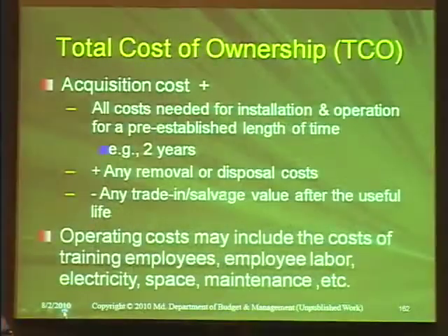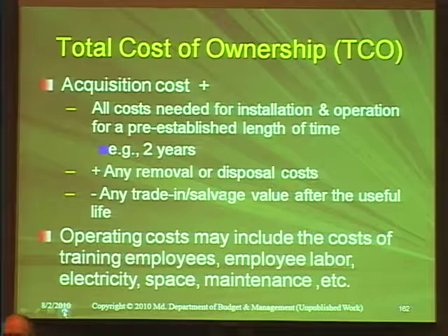Things as simple as training. If one is a system you have and you're familiar with, and all your employees are involved with it, know how to use it. And if you go to a new system, then the people that use this have to be retrained. What is the cost of the training? How many days do they have to be out of the office? Do they have to pay the vendor to do the training? How much does the vendor charge for the training, etc.? Anything and everything goes into this analysis as long as it is authoritative and objective.